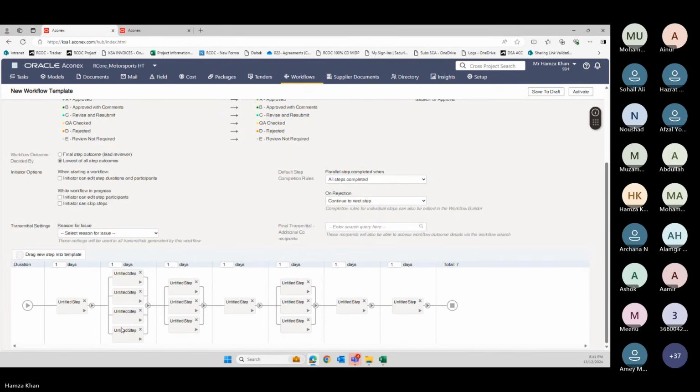And the outcome will not differ. Okay. Like this guy, he says this document is code C. This guy says, nah, it's code B. Or this one says, okay, no, this one is code A. This one says, I don't want to review, skip me. So the contractor will be informed, consultant, PMC, whoever, they will be informed, okay, please skip this guy. So contractor DC, they will simply go in the workflow, select the document and select the workflow and they will say skip.